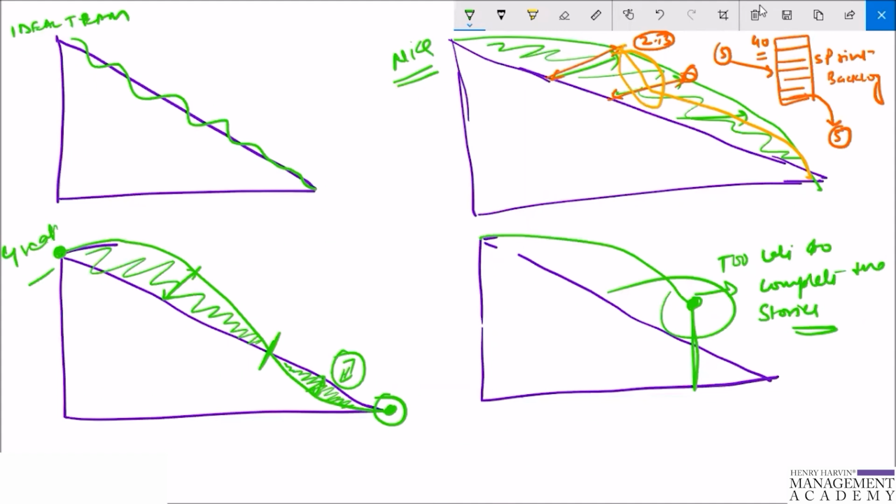So if the team is taking much time, like we said in this graph, we cannot understand the scope creep. So here also we can say that the team is taking more than expected time to complete the work, or something is slowing them down. And what that something is, we cannot identify from the burn down chart. For that we need another kind of chart, which is the burn up chart. But like I said, you can have here a scope creep line, another line, which is generally not recommended in the burn down chart. It has to be in a burn up chart. We will see why it should be in a burn up chart.